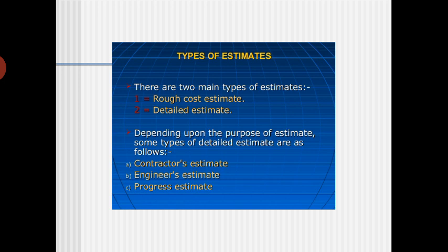We already discussed the rough estimate and the detailed estimate, but how we do a rough estimate, on what basis we do it, and why it is necessary. Normally before starting the estimate we go with a rough estimate, and it requires a plus or minus standard deviation of 5 to 10%. So how are we going to find out the rough cost estimate and the detailed estimate?